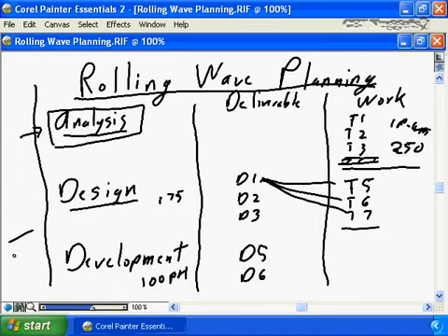But when presenting that total project effort, that 525 number, you need to ensure you're presenting it in a way that people understand that there's a degree of imprecision, a degree of flexibility, that it's plus or minus a certain percentage, plus or minus 75%. When you're doing rolling wave, it's important that you present that the total project size has been estimated, and you have a certain degree of confidence, potentially not high, because we're simply doing a very high-level cast of what our further out phases are going to be.